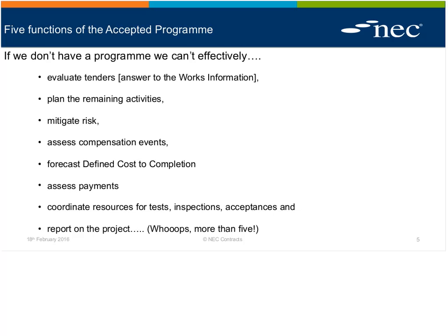So the problem with programmes at that point was, I think, the last curve, they were used as a claims receipt device, not a management tool. So what we're talking about here is using this to help people manage the project or contract better. Absolutely, and because compensation events, so 62.2 in how to prepare a quotation, rely on time and money, time and price, if you like, being presented as one for each event. So unless you have a contemporary programme with which to constantly measure that, you'll very quickly end up in a situation where there is no provision for a global delay claim. It doesn't exist. So you'll disadvantage yourself enormously.